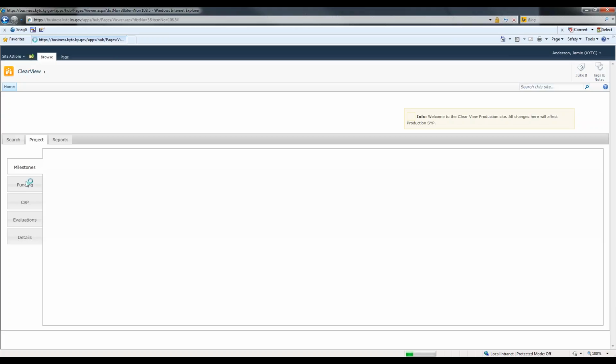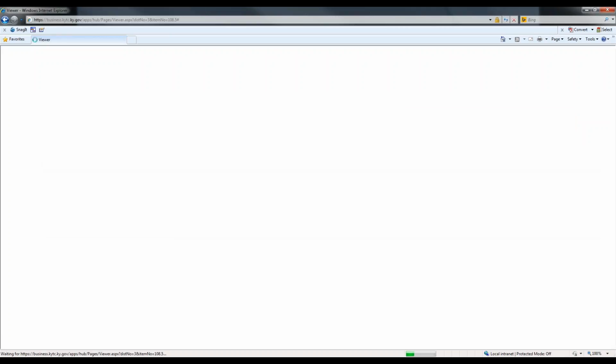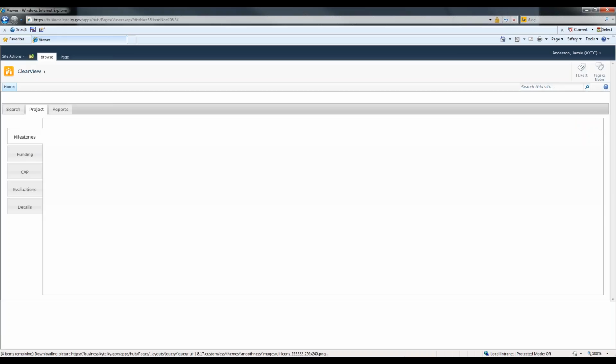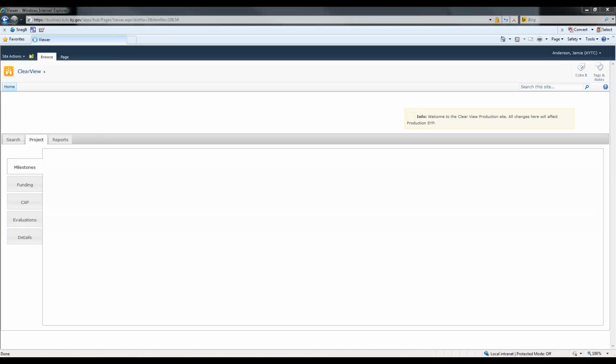On the Funding tab, there are two tables. The Authorized Funds table will list all phases, funding codes, authorization dates, and authorized amount. If a phase is not authorized, it will be listed in this table, but will have no authorization date, and the authorized amount will be 0. The projected remaining cost table is where you update your current cost estimates.